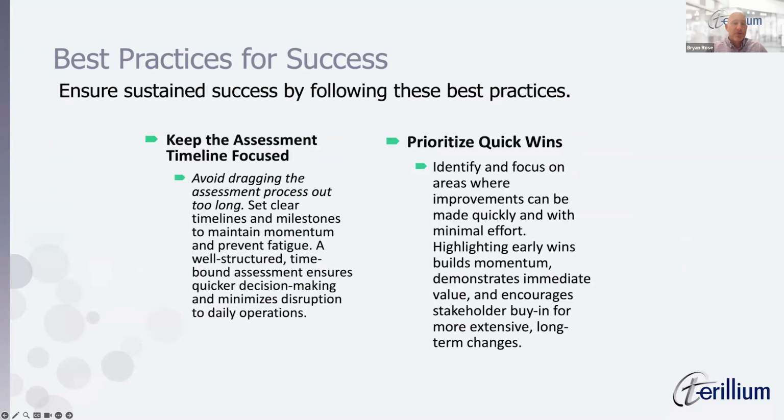The last two are related to keeping the assessment time boxed. So anytime we go through, and I would recommend this to anyone who does their own internal assessment, don't drag it out, right? Try and get in, do the workshops in a 1 to 2 week at most time frame, so you're not dragging out the assessment process longer than it should be. A lot of times we see companies where they'll have a session once a week for 3 months. Well, that from a momentum perspective is very hard to gain any traction versus just taking a couple of hours a day for a week period and knocking it out.